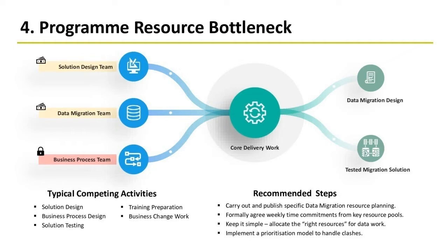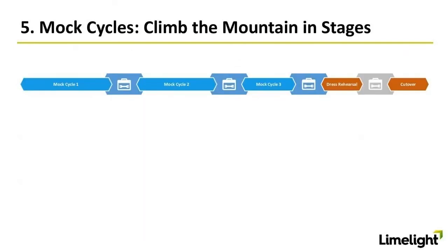Okay, that's a little bit about the execution time for the migration teams, what can happen in terms of resources. Brian mentioned a little bit earlier on in the session these test cycles that we tend to run from a migration point of view, mock cycles. And one of the other challenges that we think is pretty common on a program, which isn't immediately obvious, is that these cycles are often seen as something the data migration team are sort of doing in isolation, at least for a period of time. So on the screen, what we can see is a series of test cycles numbered 1 to 3, moving to a dress rehearsal, which is a very formal, final test run through prior to a cutover, and then the cutover itself.